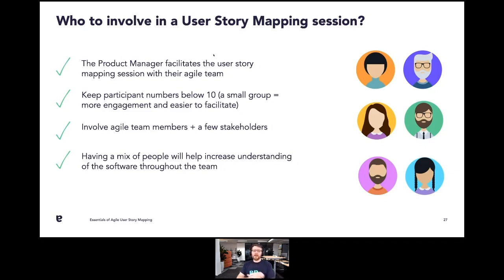Because we were touching on various aspects, like the Android app, we had the Android app representative in. We were touching on user authentication and some network engineering. So we actually had stakeholders that we would have dependencies on outside of this immediate team. They joined the story mapping session so that they could sanity check some of the things that we were doing. But obviously, you just have to be mindful that if you bring in too many people, it's not going to be effective. If you have too few people, there might be external dependencies that you're not accounting for when you go into that sequencing of your work. So it's certainly something to keep in mind.